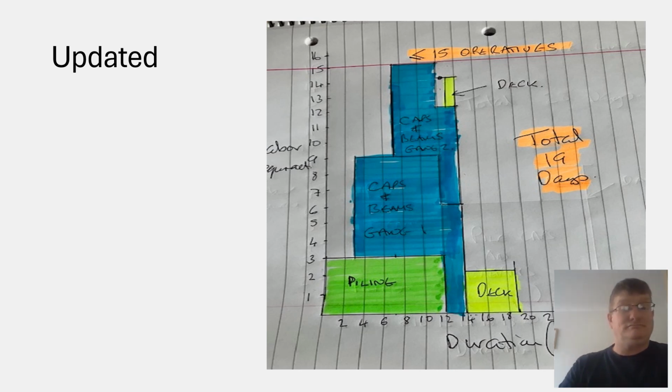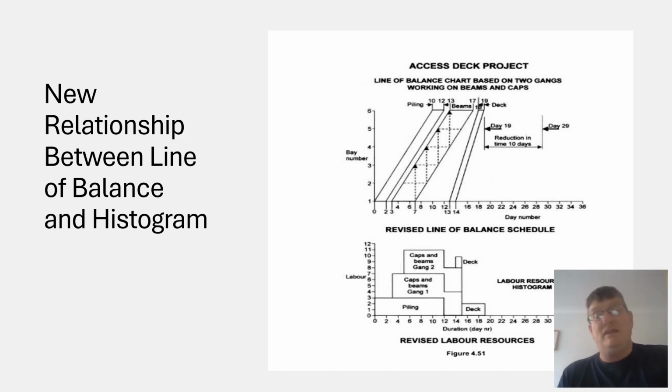So, if I show the relationship, I'm going to go back to the book and show you the relationship and how it goes into balance. Okay, there you go. Now you can see it's much more in balance. So the buffer's at the top of the chart, not so much at the bottom, with the day scale at the bottom, the horizontal scale.